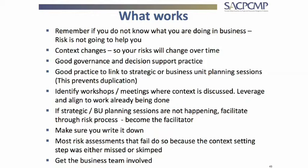Keep your risk register as a live document. People often do it for compliance to keep auditors happy, but projects are going in a direction where overruns on schedule and cost will lead to personal accountability and liability. A risk register done only at project startup and never updated again is useless — it won't be spoken of until a year and a half in when you're already behind. Make sure the first assessment is accurate so your contingency is accurate.